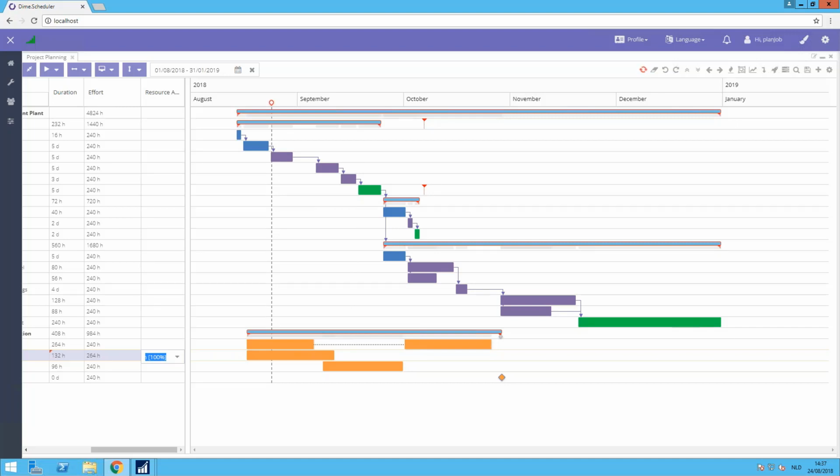It's going to take the effort as a base and recalculate the duration based on the number of resources you add. It can also be done vice versa. It can have a fixed duration, or duration driven, let's call it, and recalculate the effort based on the resources you add. That means you have a task of 10 days, you add 2 resources, then your effort would be 20 days in that case. So you would be over planning based on the criteria sent from NAV.